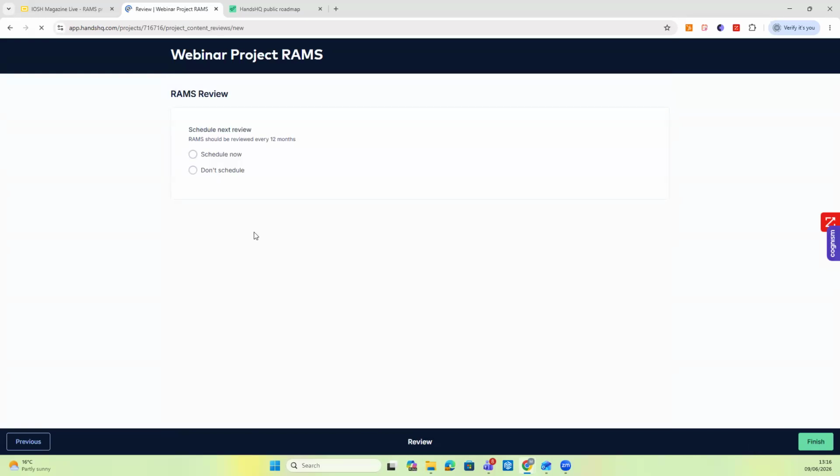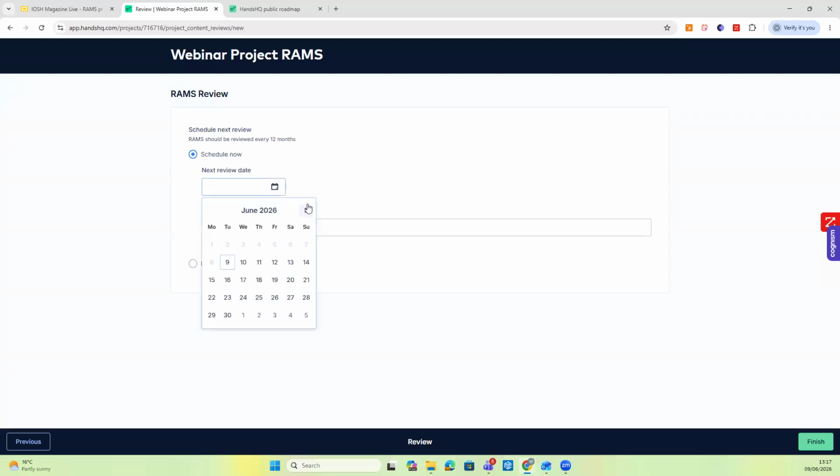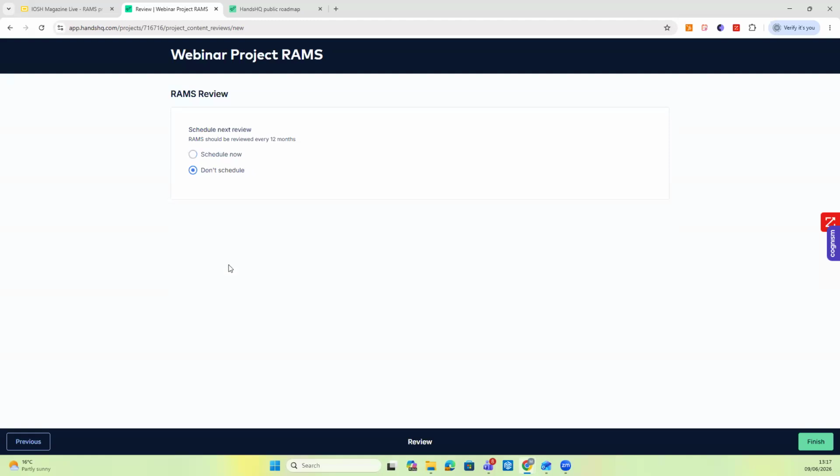And that's us done. There is the ability now to schedule a review date if you wanted to. This is typically how our customers use it. It might be some internal RAMS that they've created within their warehouse, for example. They're only going to create them once and then might review them on an annual or six-monthly basis. It could be that you're on a site where the client says this is a long-term project, we expect you to review it every 3 months, so you could do that. It could be that you're going to be in and out within a couple of days, and as a result you don't need to create a review date, in which case you just wouldn't schedule one.